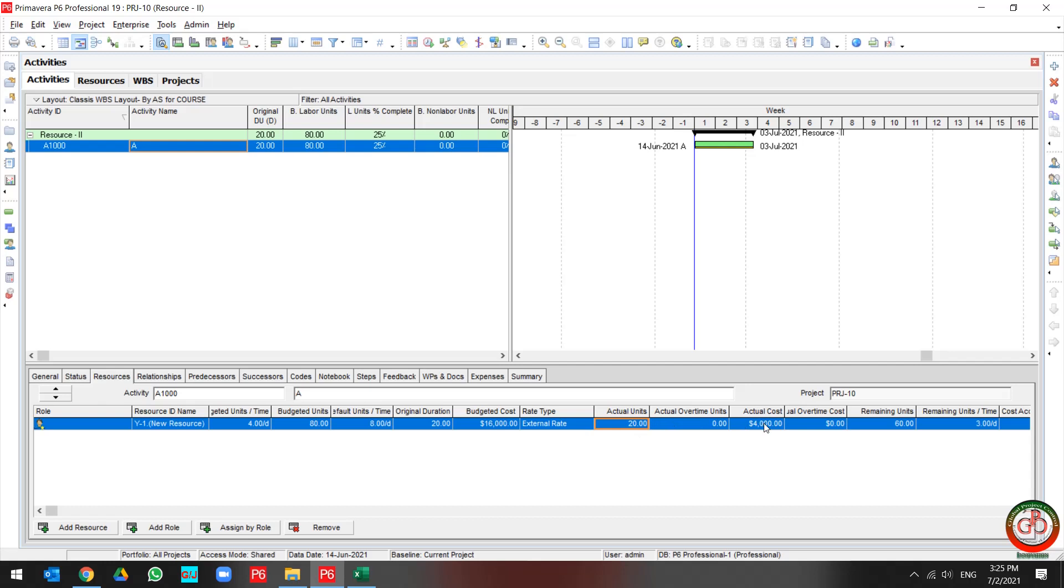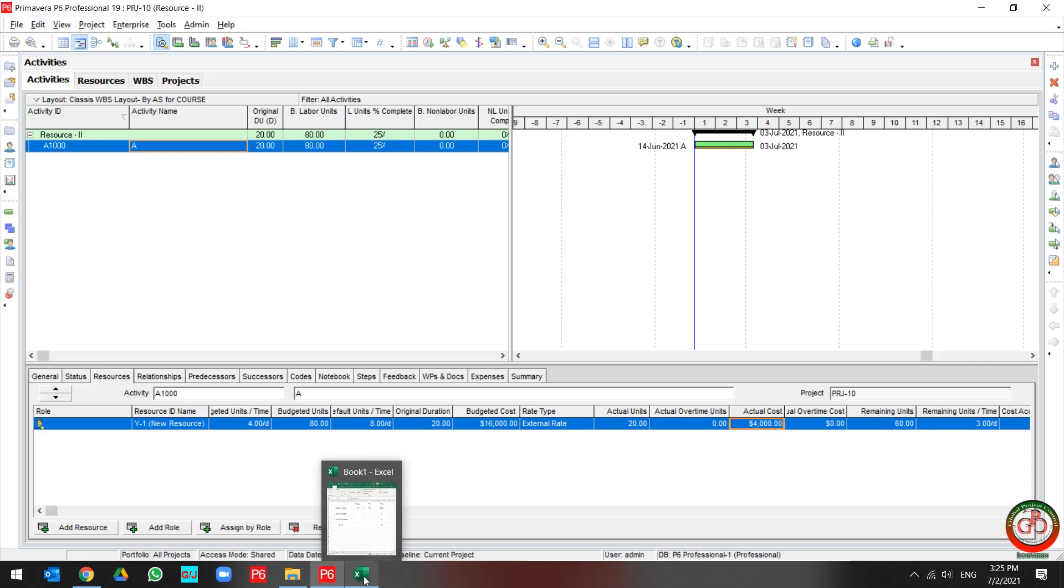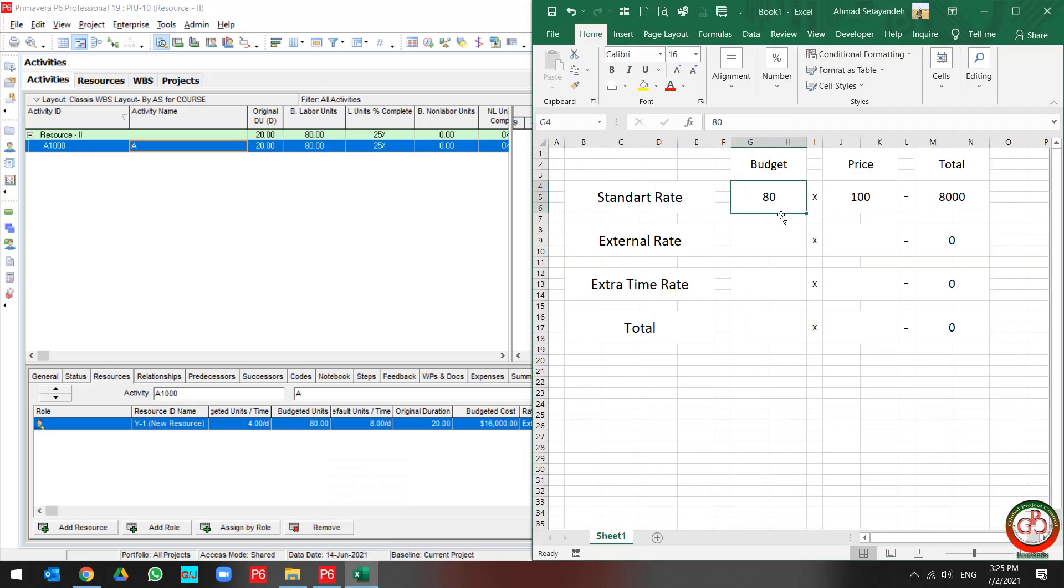As you see, my actual unit is changed to 4,000 for cost. I mean because the budgeted unit is changed to 20 and the price is 200, so my total cost is 4,000.